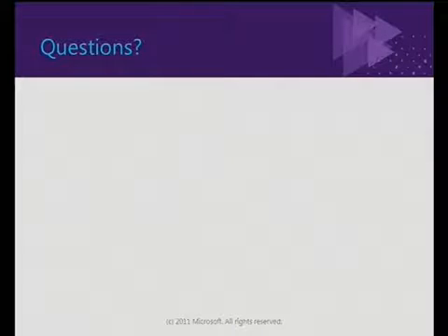These cubes, how are they being populated, real time? So the question is, are these cubes populated real time or not? Well, no, they are not real time cubes. However, you can schedule these cubes. On a general basis, I would probably say on a daily basis, because the data that you analyze in cubes doesn't necessarily need to be real time. If you need to have a specific set of information real time, resource utilization, or what am I going to do in the next 3 hours? Well, then you may want to use the relational data for that.